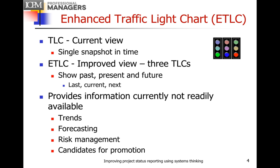The enhanced traffic light chart, or ETLC, differs from the regular traffic light chart which is just a current view — a single snapshot. The ETLC is improved because it contains three traffic light charts showing past, present, and future, labeled as last, current, and next. They provide information that's not currently readily available: you can see trends, forecasting, risk management, and possibly candidates for promotion.